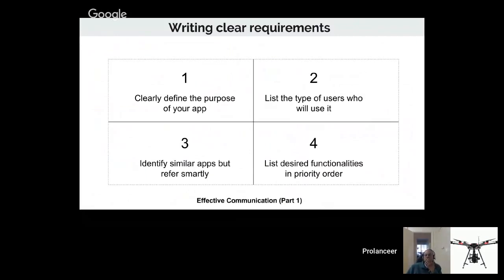and there is a template. When this happens, the outcome is going to be this. So on that template you write a list of all features, following the priority, and this is very useful so people, other developers who are going to execute, will know what end users are going to get and what kind of experience they should develop for that.